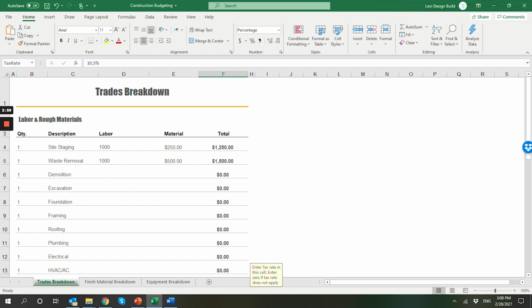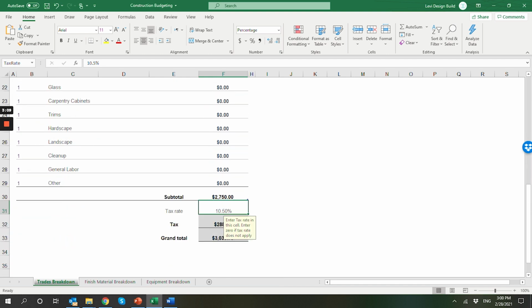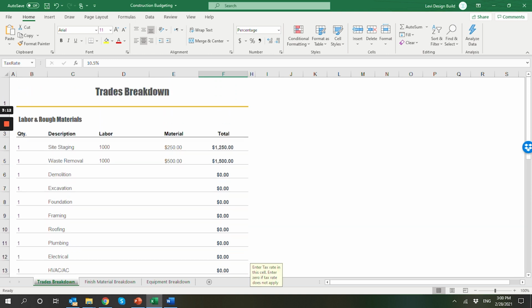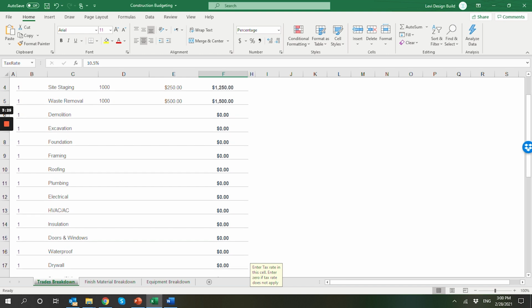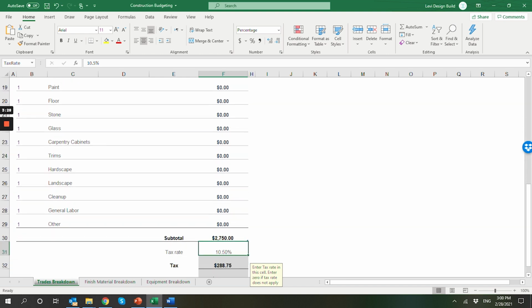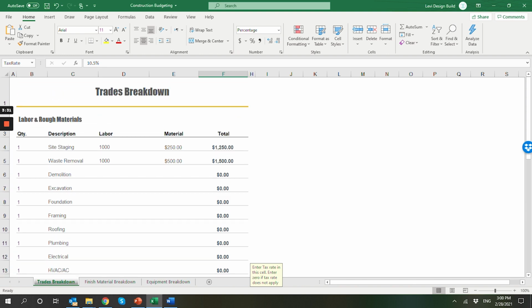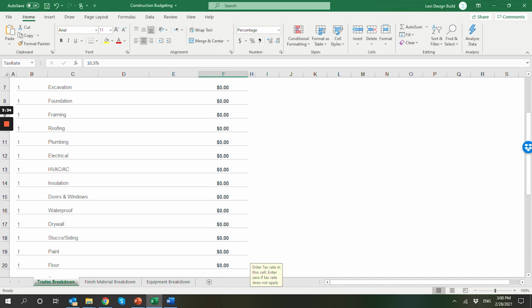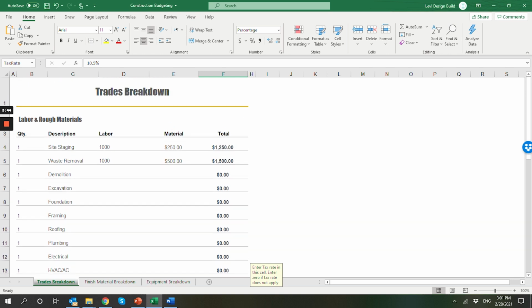Again, it's very important to put in the right information. If your contractor is not willing to cooperate, and even if it's a general contractor, and break down the different phases, something is wrong. You want to know how much every phase is going to cost. It's okay. I know a lot of contractors are not willing to separate the labor from the materials. That's very common, by the way, with general contractors. But at least break down the different phases, because this is going to be later on your guideline of how you're going to make your progress payments, based on the different stages that you're going to go through. So again, it's very important to have this kind of breakdown from all the contractors you're getting estimates from, and of course for yourself to know what it's going to cost.